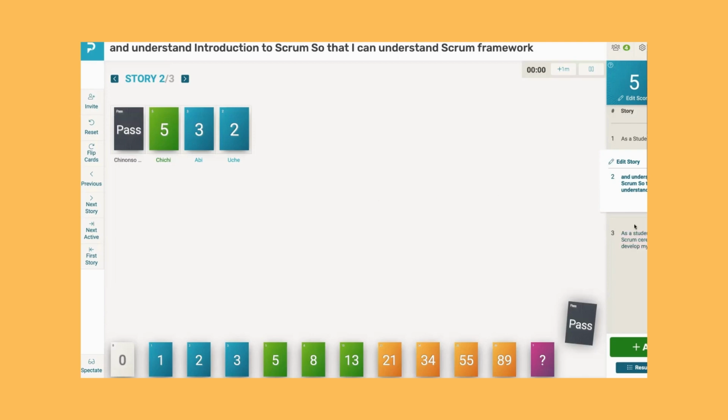Okay, so now you can also add time. Like you see, I added a timer, saying that each story is 2 minutes. Two minutes means allow every team member so that you control your time as well. Because this planning is time-boxed, or this refinement, you time-box it. So maybe you want to spend only 1 hour on this refinement.